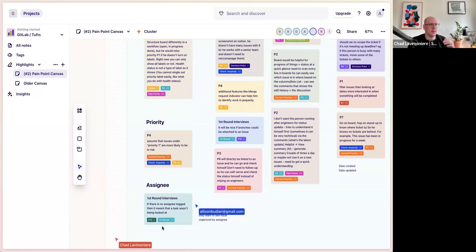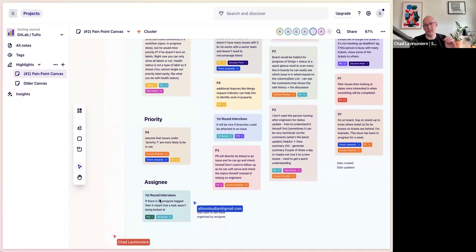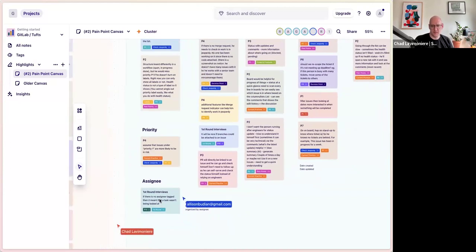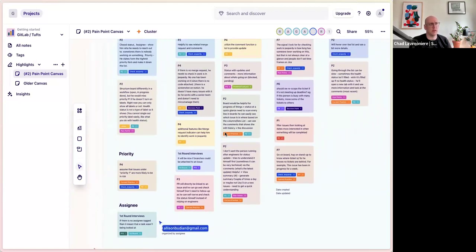Your backlog is the feed that feeds directly into your current iteration, and your current iteration is just the amount of points you are predicted to be able to complete in a single iteration based on past velocity, brought in from the top of the queue. So it's a very automatic planning method, as opposed to saying I am assigning this issue to this iteration, sprint or milestone. It's just a different way of working, but the way our boards are set up doesn't really work too well for it.